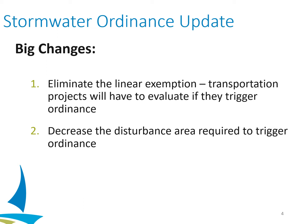Another big change is that we've decreased the disturbance area required to trigger the ordinance. Where it was originally one acre, it is now down to a half an acre.